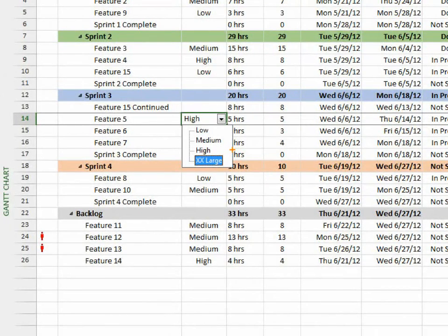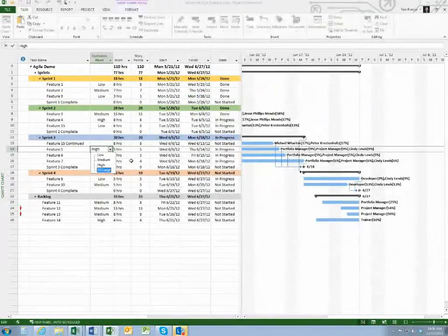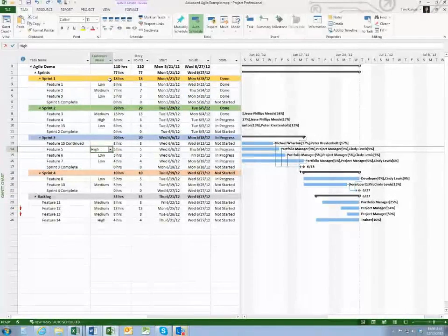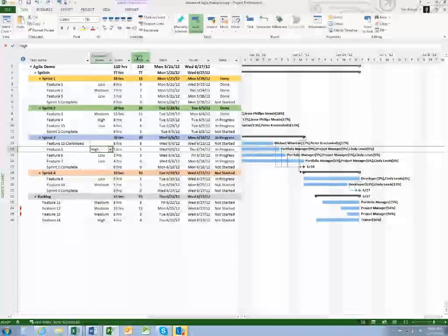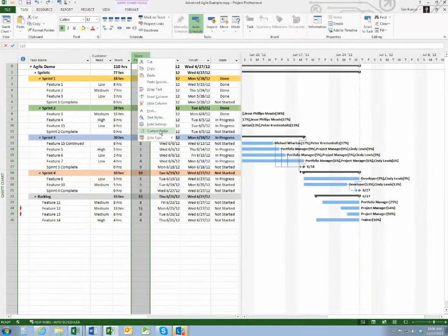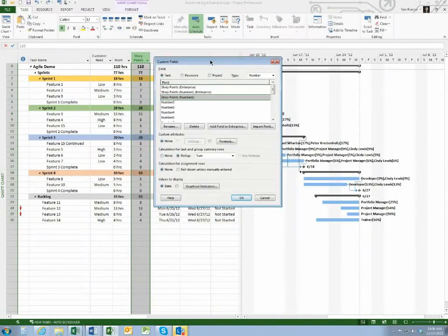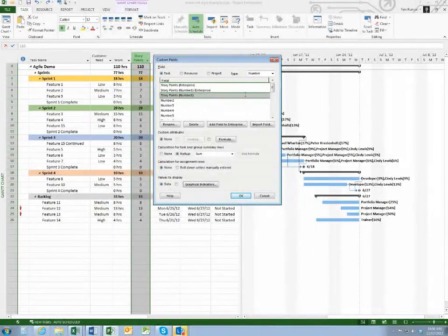Now, I haven't checked this box here, but I'm going to talk about this briefly. And again, my development team are always hounding the project schedulers and the senior portfolio advisors to say, hey, look, if you're going to build a field and you want to make sure those values show up in assignment views, meaning, for example, if there are 10 story points, or if it's a low priority or a medium priority, and I want to make that available, what we want to do is say for assignment rows, when I go to an assignment view, if you want the data that's out at a task level to show up, you need to click this box.